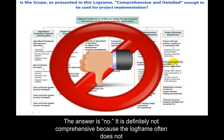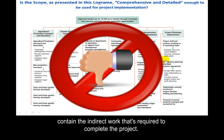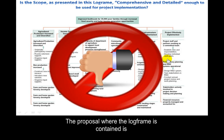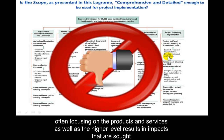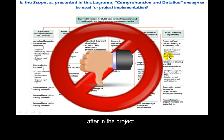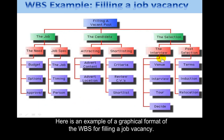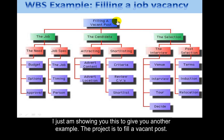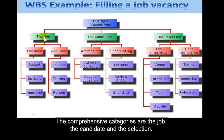It's definitely not comprehensive because the log frame often does not contain the indirect work required to complete the project. The proposal where the log frame is contained is often focusing on the products and services as well as the higher-level results and impacts sought after in the project. Here is an example of a graphical format of a WBS for filling a job vacancy. The project is to fill a vacant post, and the comprehensive categories are the job, the candidate, and the selection.